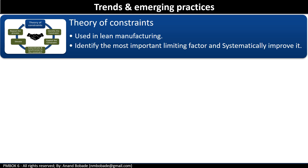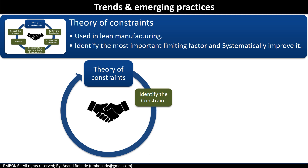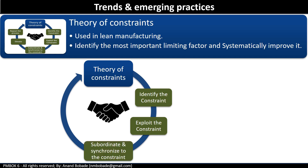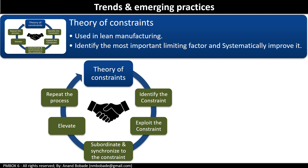The theory of constraints is used in lean manufacturing. It helps you identify the most important limiting factor and systematically improve it. A constraint is also often referred to as a bottleneck. It uses a process known as 5 focusing steps to identify and eliminate constraints: first, identify the constraint; second, make a quick improvement using existing resources — make the most of what you have; third, review all other activities in the process to ensure they are all aligned; fourth, elevate — take analysis to the next level, and if the constraint still exists, consider what further action can be taken to eliminate it; and finally, repeat the process until it is no longer a constraint.